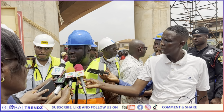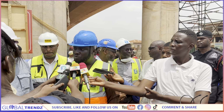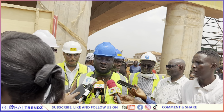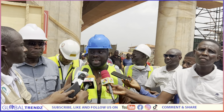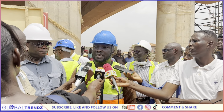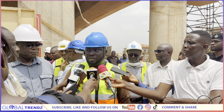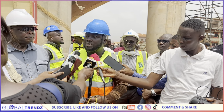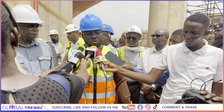So from there we came here and we're here to ask for part of the owners that we need to give to make sure they help us with their chief director, to ensure that the meeting is organized as soon as possible. Also with Ghana Water, we meet with the heads together with the contractors. What we will need to do is to phase it out. So we would do publicity, community engagement, and we count on the media to help our people and let the aspect of town that will be affected know that you will not have water for these number of days. And we will alert you ahead of time so that you can store water whilst waiting to be connected. We also count on the people's support on that. So we will engage Ghana Water.